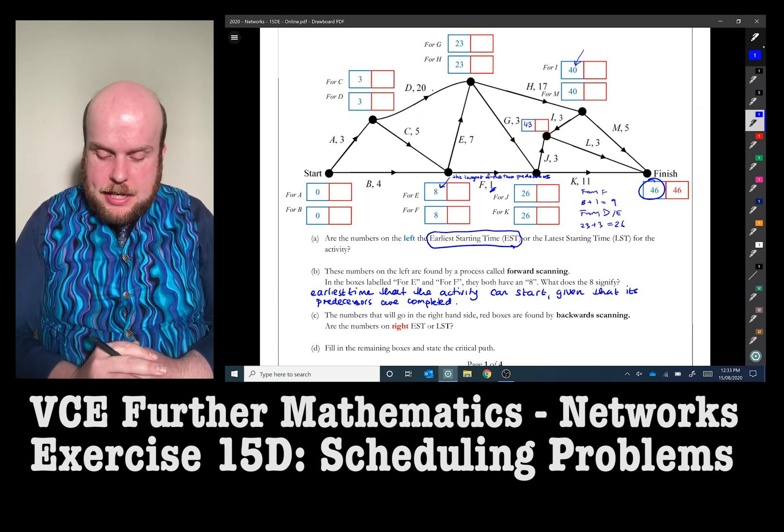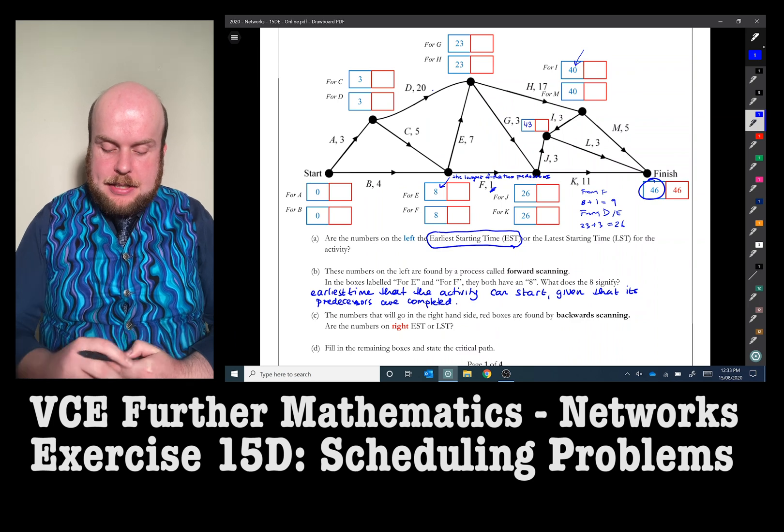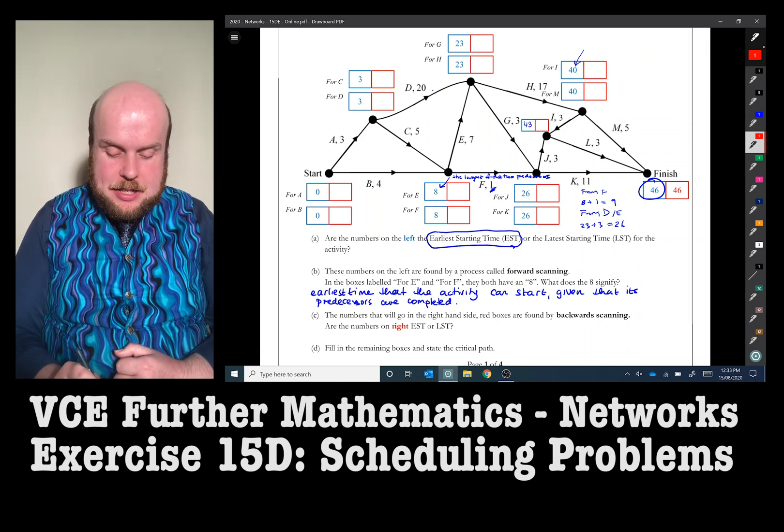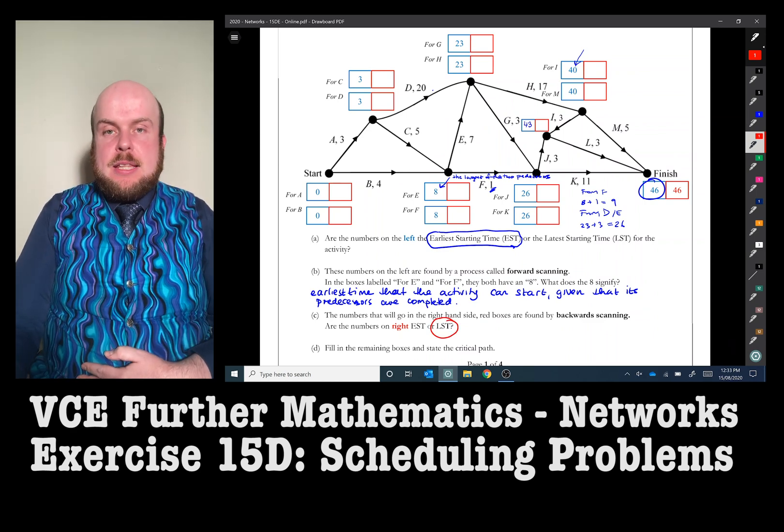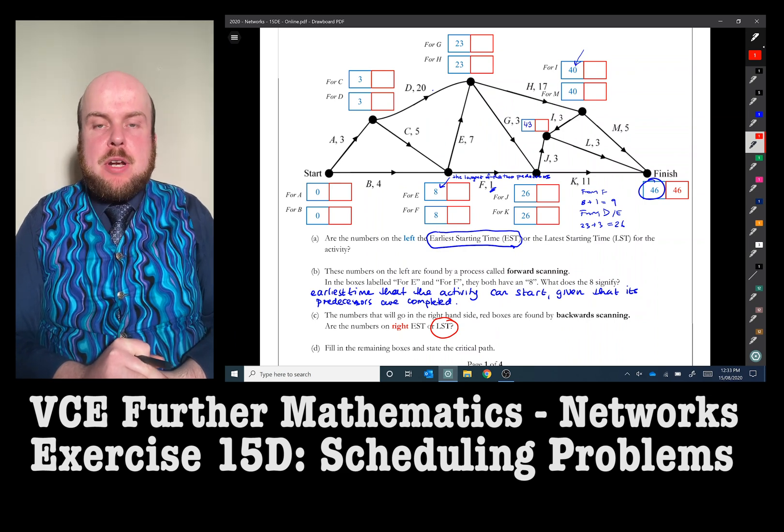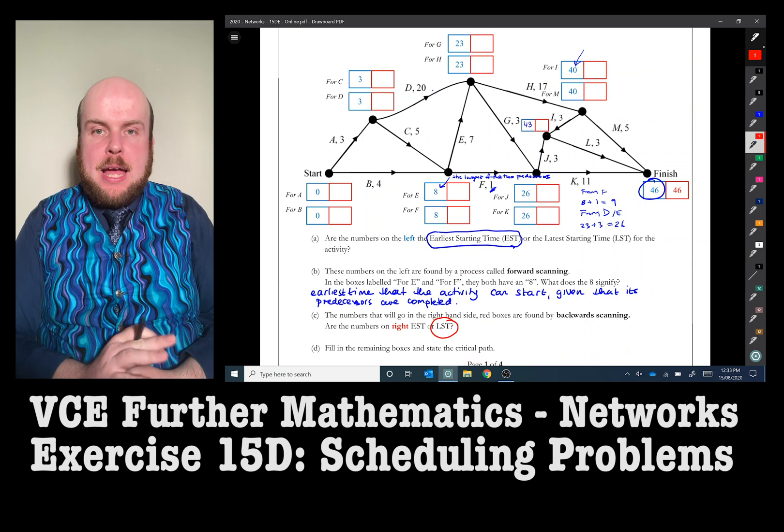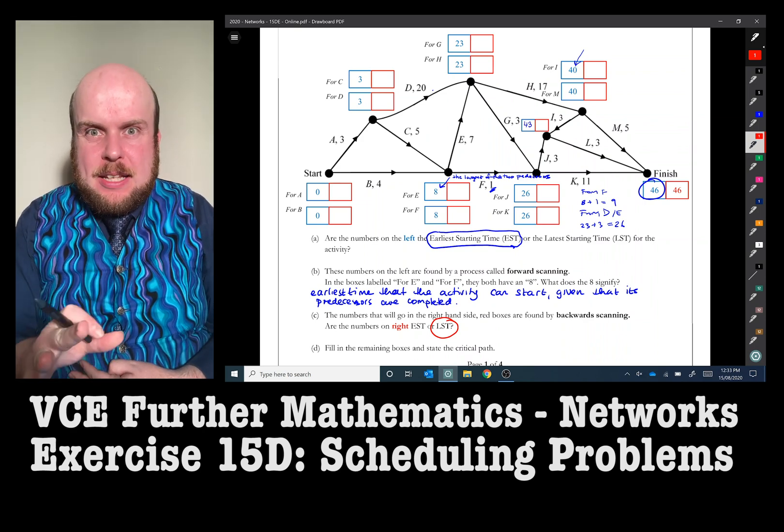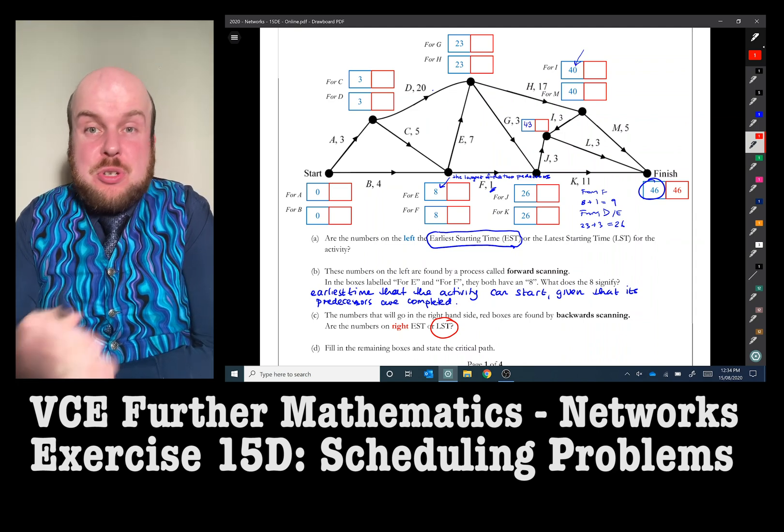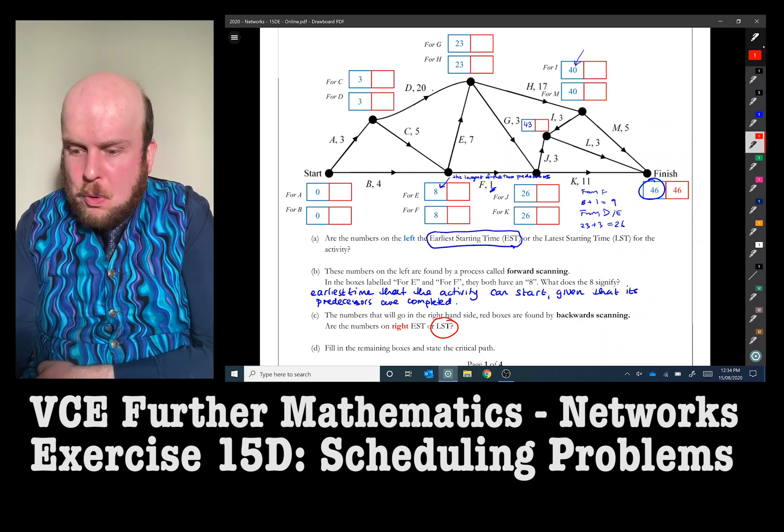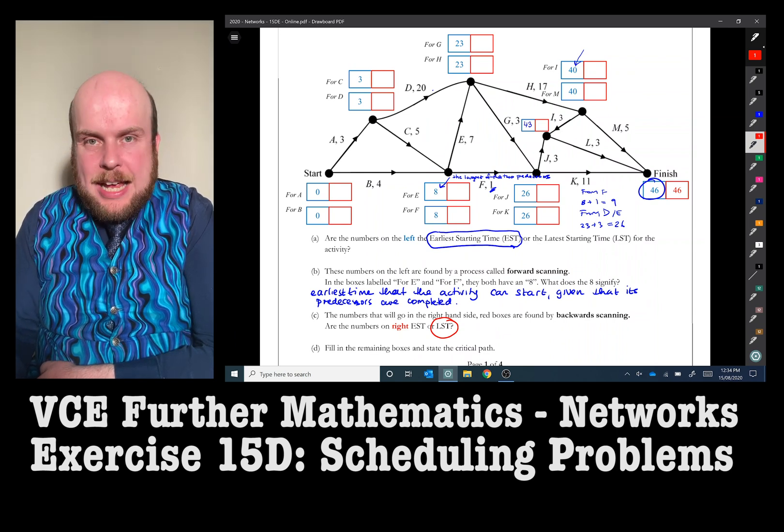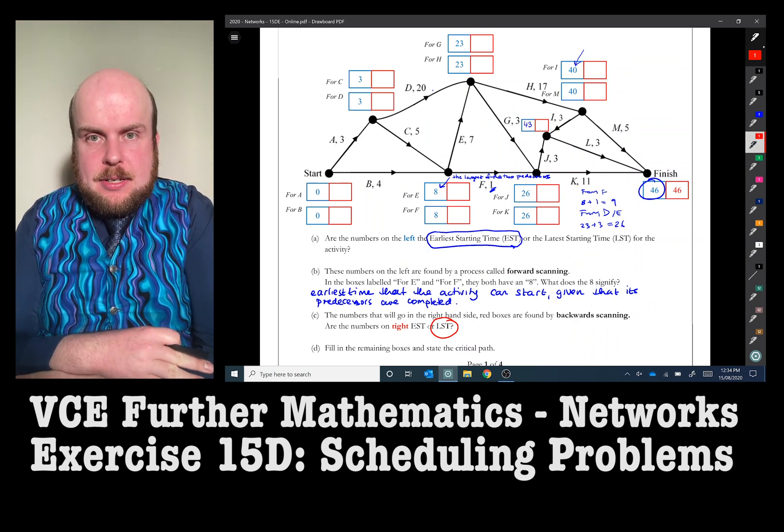The numbers that will go on the right-hand side in red boxes are found by backwards scanning. Are the numbers on the right EST or LST? Well, given that the numbers on the left are the earliest starting times, we can probably eliminate to suggest that the ones on the right would be the latest starting times. So you'll notice there that at the finish, we've got this 46 here. That is because in order to model this accurately, we want to make sure that the latest finishing time for a project is the same as its earliest finishing time, which is 46. And don't get too confused by the fact that I say finishing time, starting time, whatever. I'm just saying that the project, the quickest we can get this project out is 46 hours. So if that's the case, we want to make sure that we're not going to spend any more time than that. If we do, then all of this scheduling is for nothing. So therefore, whenever you do finish, the amount of time it takes, we always suggest that the latest time we can finish it is the same time.